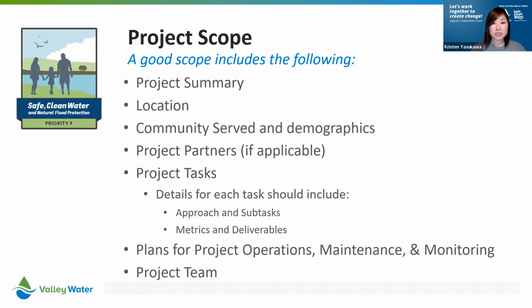So we typically will recommend that you have maybe a description of the approach of your project and then breaking it down into smaller segments. The task could be based on what the deliverables are. They could be based on time. So it could be planning, design, and construction as your task 1, 2, 3. It could be, one of them is going to be outreach, or another one is going to be the educational component, and the other one's going to be the litter pickup.